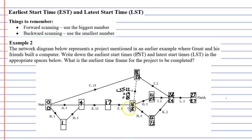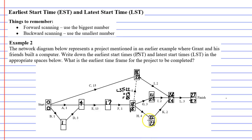Why do we pick the smaller number? If we picked 19 instead, then going in one direction 19 plus 0 gives us 19 — that's fine. Going another direction 19 plus 3 gives us 22 — that also lands correctly. However, 19 plus 4 gives us 23, and we can see that this would delay our project by one minute, which we don't want to happen.